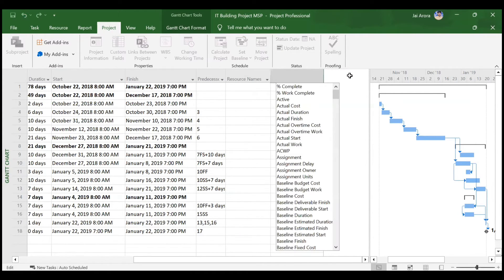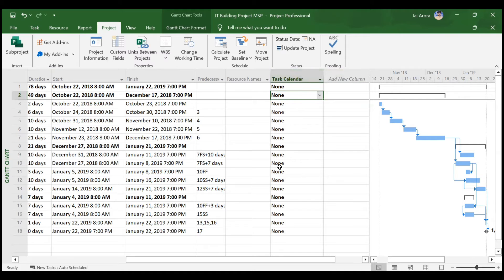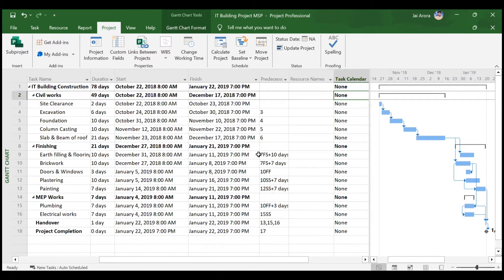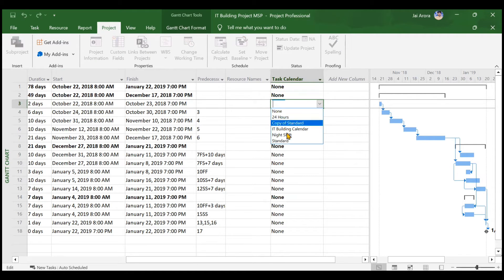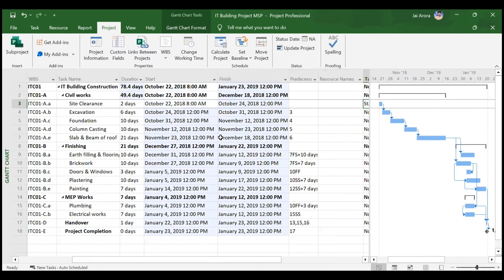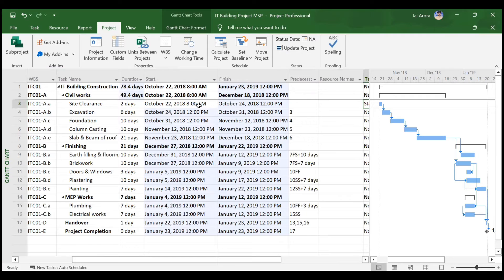As an additional feature, you can assign a calendar to a specific activity. Right now every activity follows the IT Building Calendar. To change a task calendar, type 'calendar' in the column header area and the Task Calendar option will appear. For example, if the site clearance vendor won't work on Saturdays, you can assign the Standard Calendar to that activity. When you assign the Standard Calendar, the hours change to 8 hours per day, so the timing for site clearance shifts to 8 a.m. to 5 p.m.